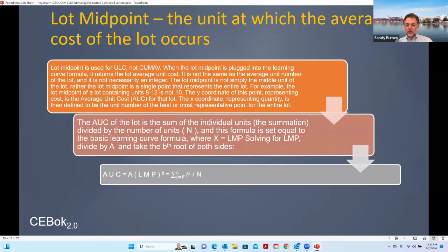So some of the things I've had to estimate, you start production in one year and three years later, the final assembly comes out. That tells you it's a very low rate, and you have to use averages over the lots, because there is learning in the touch between the first unit in the lot and the second unit and the third unit in the lot. Okay, Tom, if we go to the next slide.